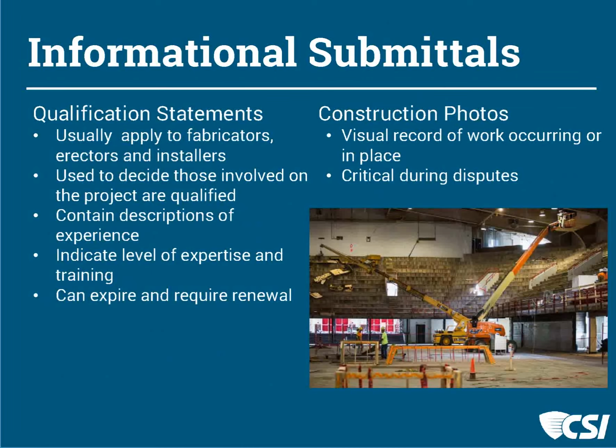There are things that require renewal, particularly if a job lasts over a calendar year. So that's something that you want to stay aware of and follow up on. And then the last thing under informational submittals may be construction photos.